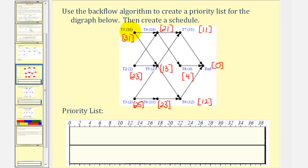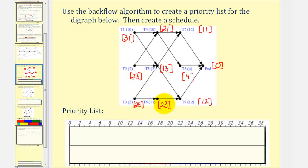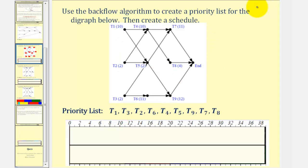Now we create our priority list, listing the tasks with the largest critical time to the lowest critical time. Task one would be first, followed by task three which would be second. Notice that task two and six have the same critical time, so we typically list the lowest task number first — so we list task two and then task six, and so on. You may want to pause the video to verify that you get the same priority list.